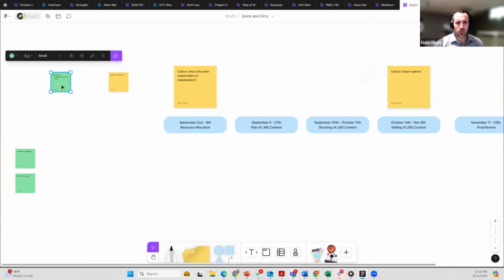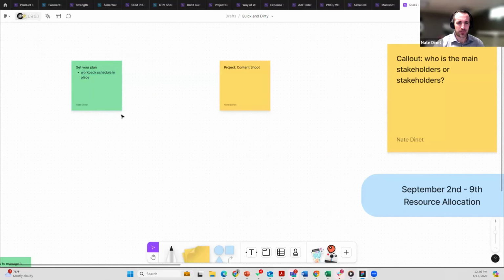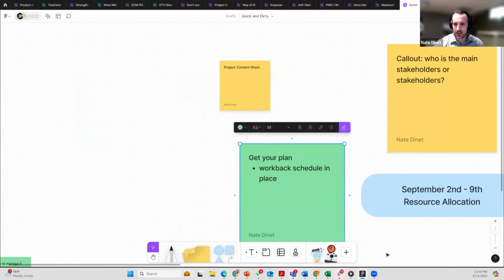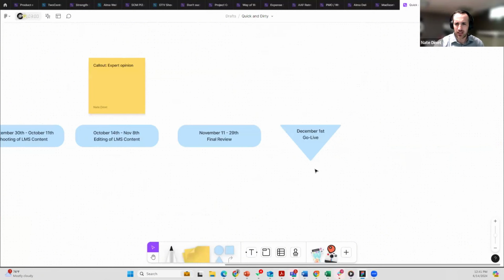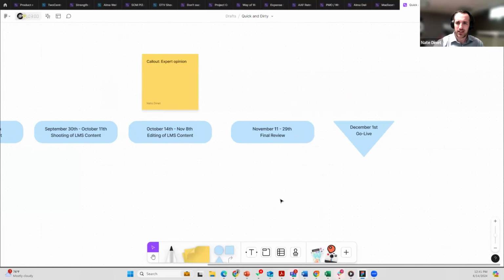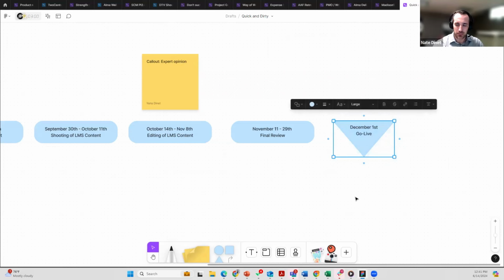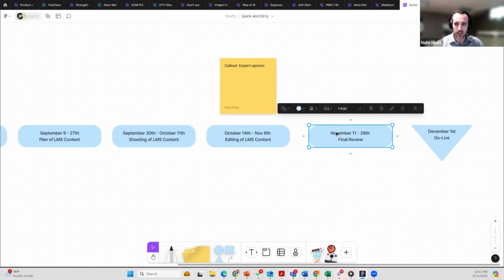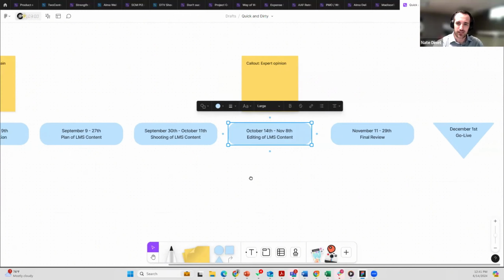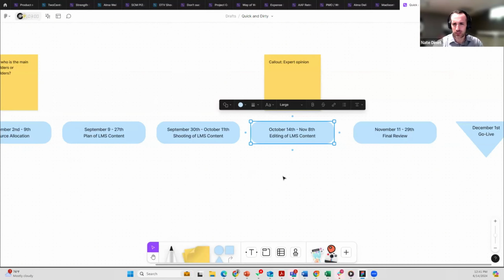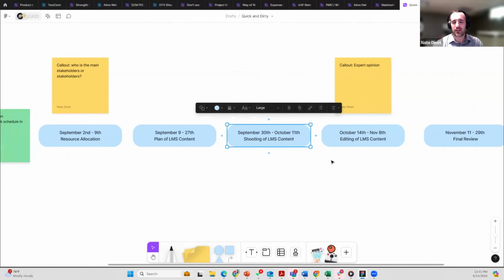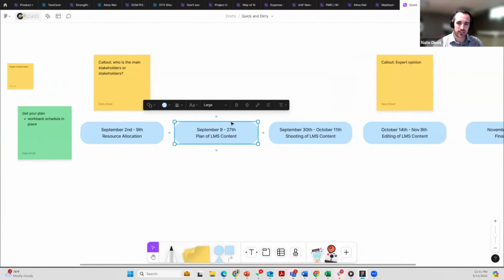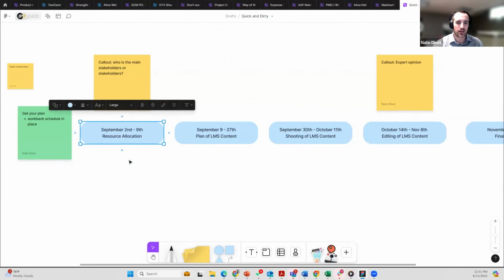All right, but look at what we've done. Okay, so quick and dirty. What we've accomplished is we've got a work back schedule in place. We've got our plan. We know that if we want to have LMS content ready for December 1st, with no other information at hand, we took a swag, our best guess across all this information. So December 1st, we have our go live. November 11th through the 29th is our final review and revisions. Then we have editing of the LMS content about 2 weeks, or maybe 3 weeks, before then. Then we have another couple weeks of shooting the content, another 3 weeks of preparing and planning the content. And then finally, we have a resource allocation.